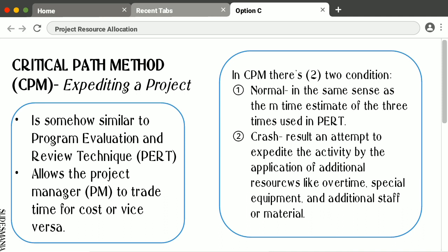So, it is standard practice with PERT or CPM to estimate activity times under the assumption of resource loadings that are normal. To discuss time requirements for any task without some assumption about the level of resource devoted to the task makes no real sense. At the same time, it does not make sense to insist on a full list of each and every resource that will be spent on each of the hundreds of activities that may comprise a PERT or CPM network. Clearly, there must have been some prior decision about what resources would be devoted to each task.